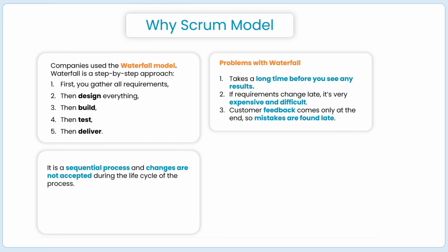Now let's understand the problems with Waterfall. It takes a long time before you see any results. If requirements change late, it's very expensive and difficult. Customer feedback comes only at the end, so mistakes are found late in the project.